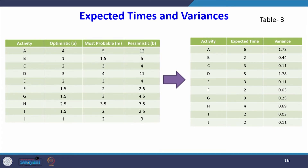Using the mean and variance formulas, the three time estimates are converted into a single time estimate and a variance for each activity. For example, activity A with three time estimates 4, 5, 12 is converted to single time estimate 6 with variance 1.78. Like that, I have found the expected time and variance for all the activities.